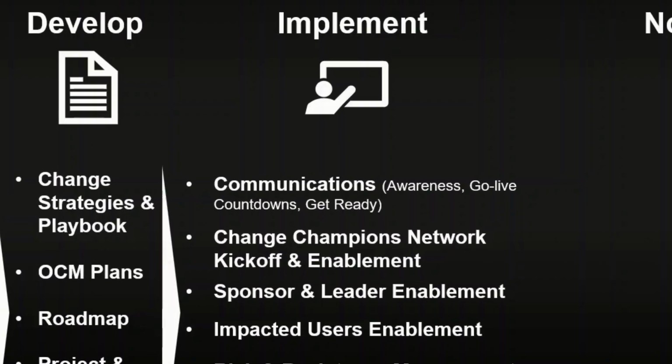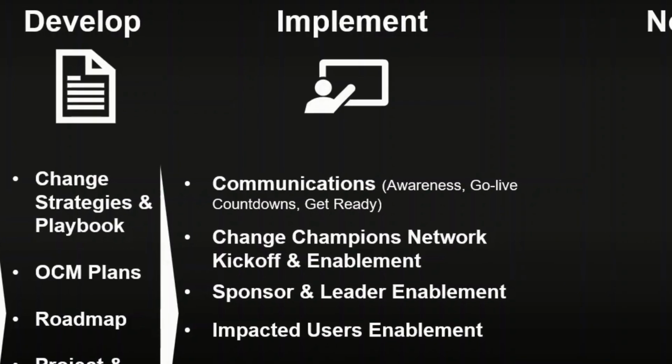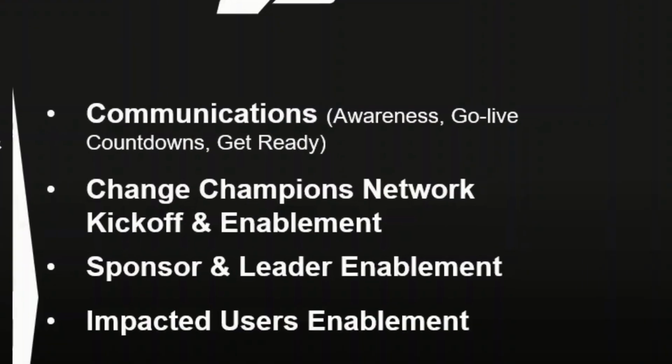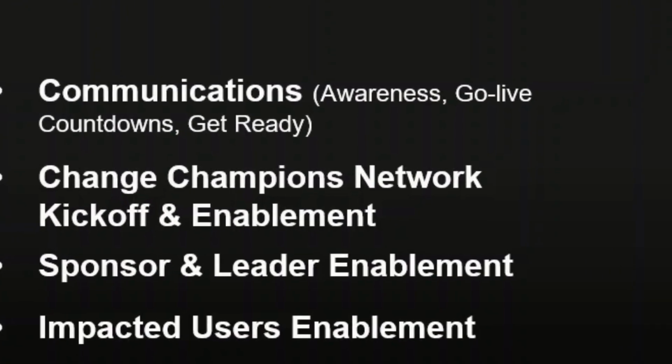During the implement phase, you want to implement your targeted messages and communications to raise awareness and also prepare users for go live. You want to implement your change champion network, conducting a kickoff session, and also enabling your change champions. You also want to ensure that you enable sponsors and also leaders. As part of my consulting approach, I normally use a white glove approach to empower and also enable leaders to get them prepared for the change.